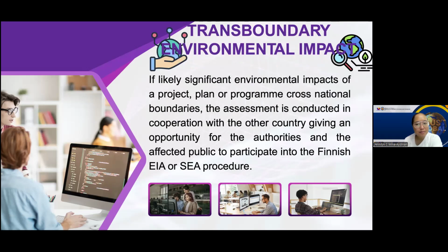Of course, transboundary environmental impact, which refers to the environmental effects of a project, plan or program that cross national borders. So if a project in one country might significantly affect another, both countries cooperate in the environmental assessment process, which ensures that the authorities and the public in both countries can participate and be informed about potential impacts.